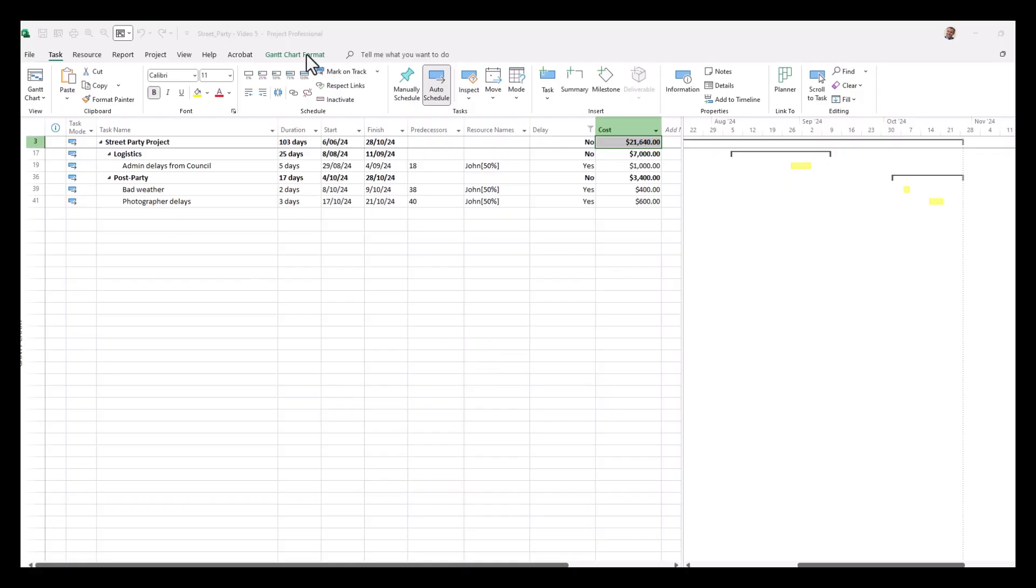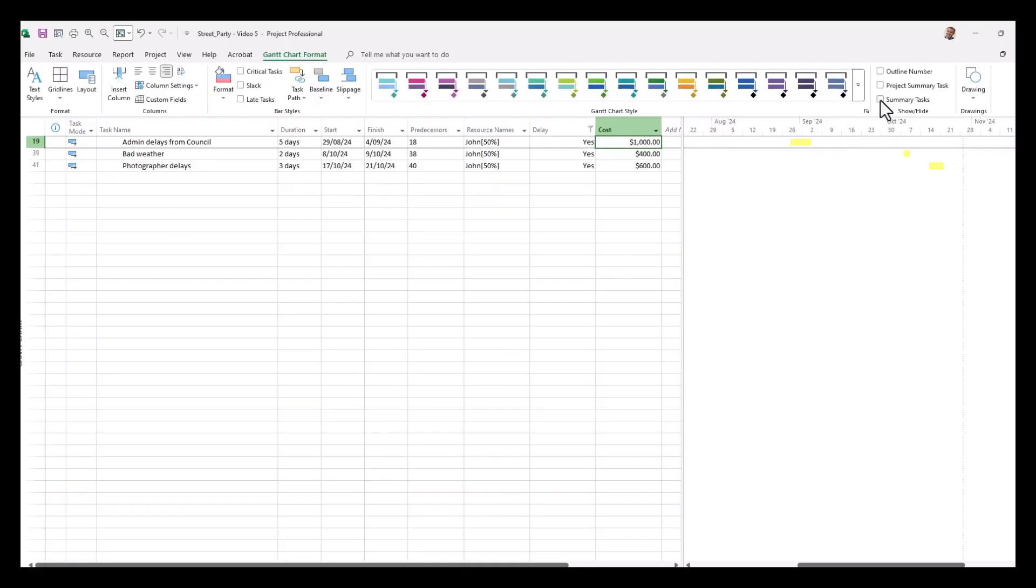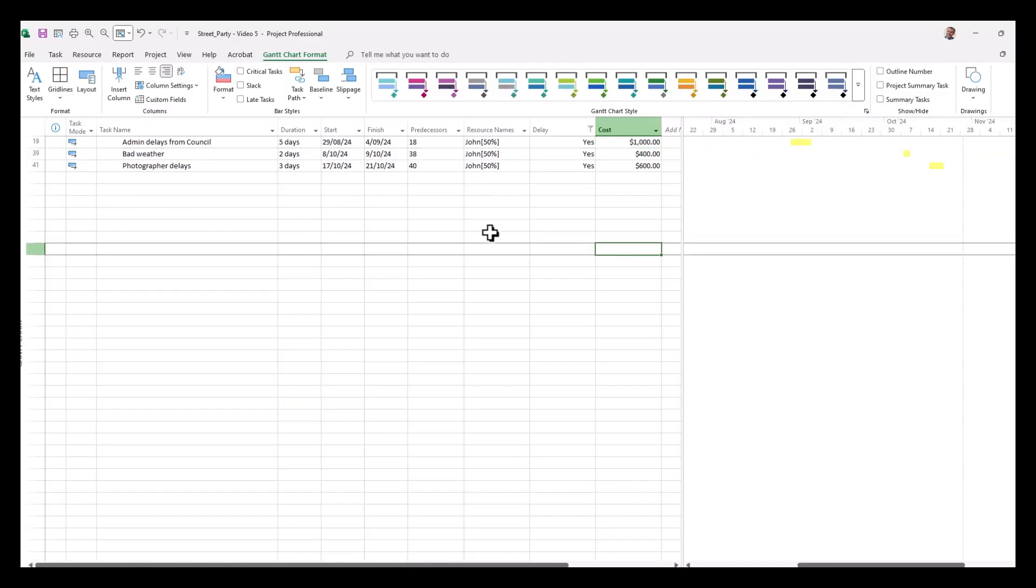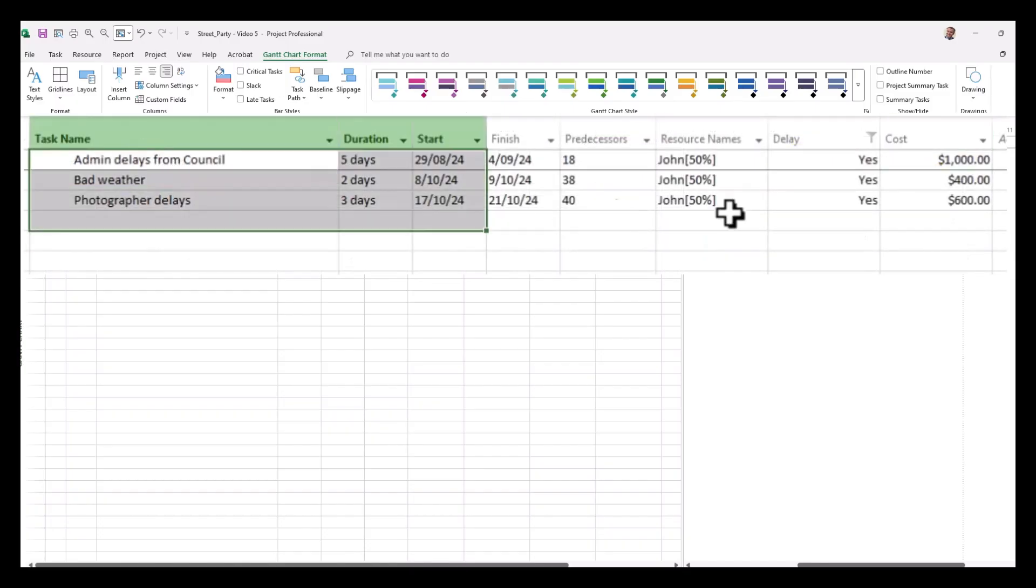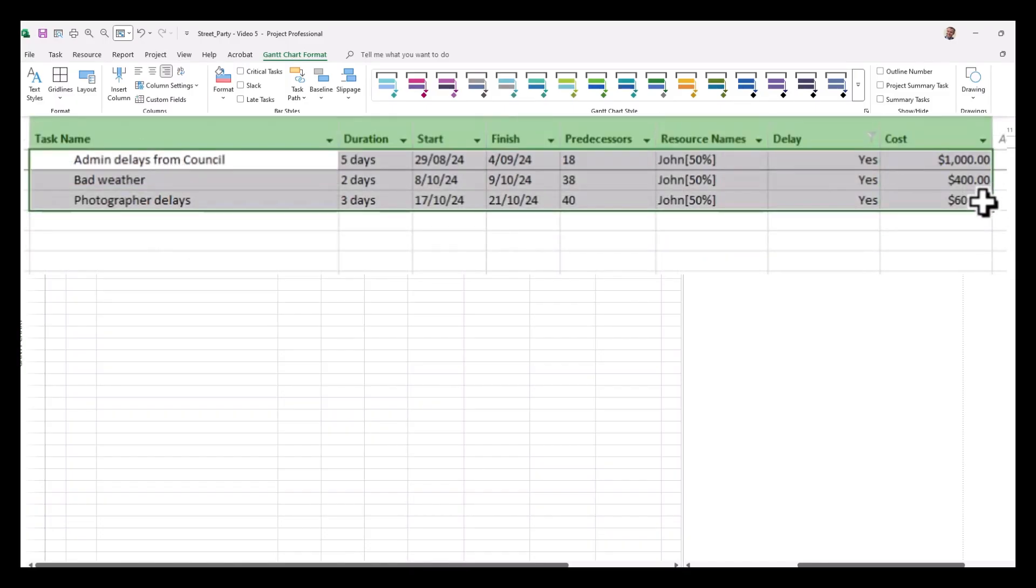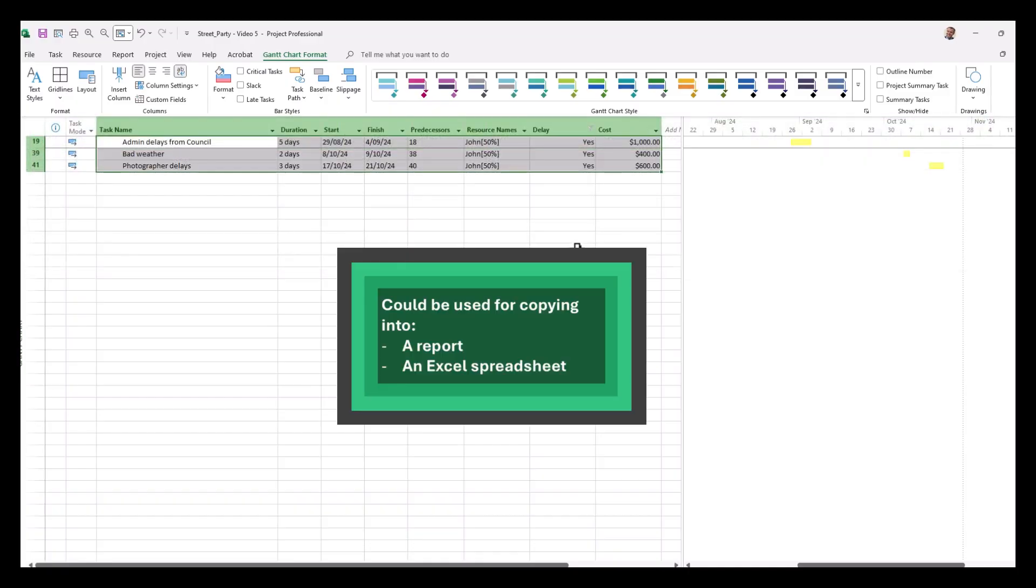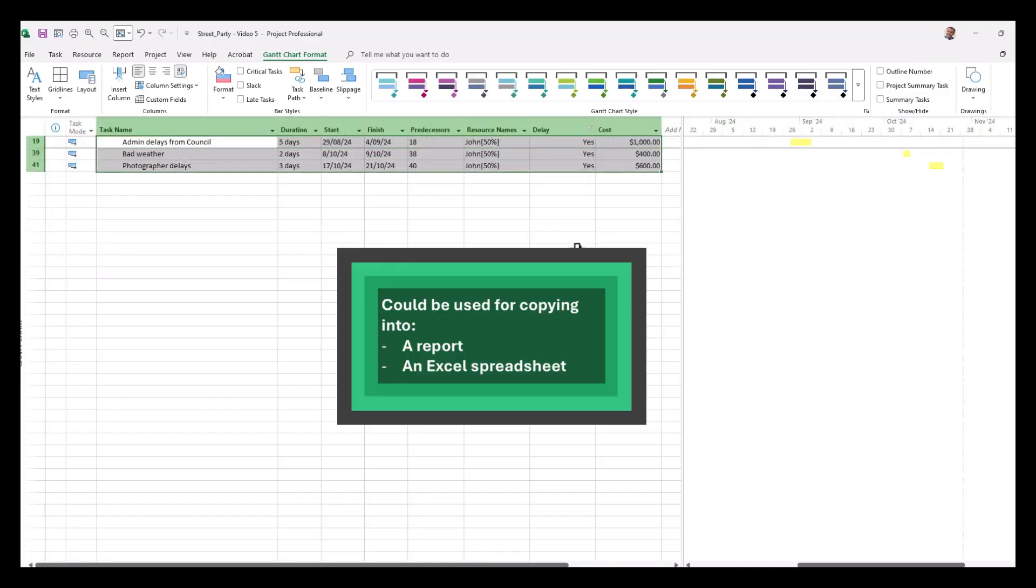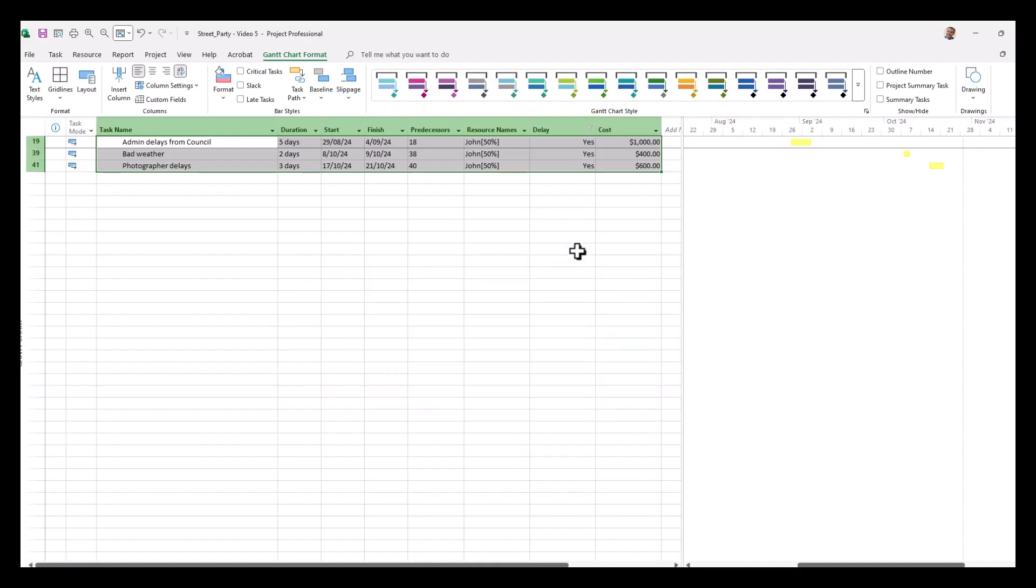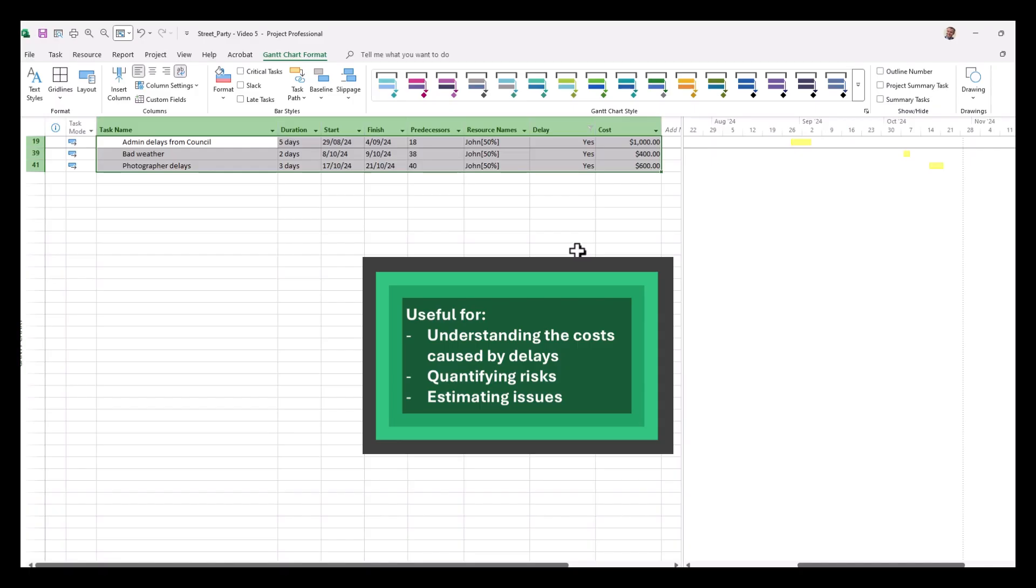Now to make this a little simple to digest, we can go to our Gantt chart format tab, remove our summary tasks, and there you have a nice little report that could show you how much the delays cost in this project. So in this case, 1000 plus 400 plus 600 equals two thousand dollars. So it's an excellent tool for project managers to get in there and highlight the costs caused by delays of a project.